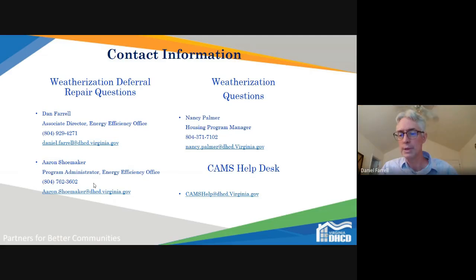Yep. Let's see. John is asking about the material costs, a couple days for price guarantee, and unforeseen work that arises while they're in process. Yeah, we'll need a change order process. Again, we understand some of the challenges right now out there in the market. Let's try to see if we can catch it at the front end, when we're doing the project setup and approval. But yes, we will have to set up a process to reapprove.